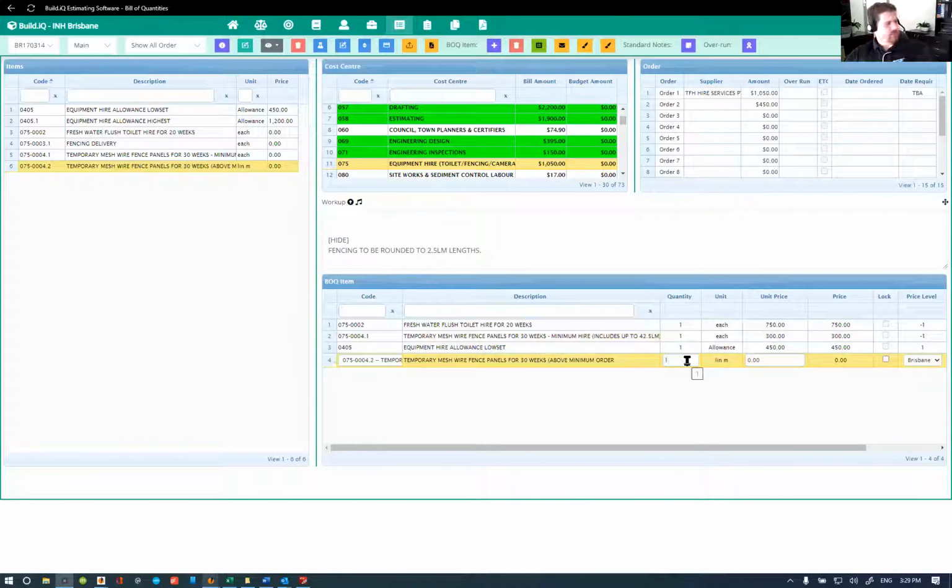Now we're going to assume, say, probably 25 linear meters of it and standard earthworks. So we'll just say, I don't know, 60 cube. That's moving soil in both directions. Actually, probably back that off a little bit. That'll allow for about 4.5, 5 hours of site cut and spreading of soil around. House set out. Only need 1 of.